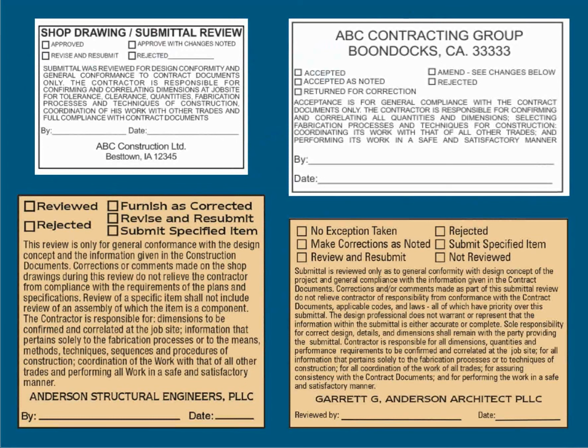or change your specifications. And this is what has led to people including a submittal schedule in their documents, because, as I said, they don't need paint immediately. They need steel immediately. And so you can set that up in your project specifications to protect yourself as much as inform the contractor.